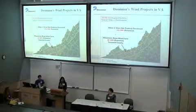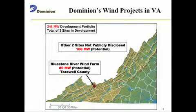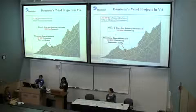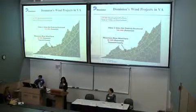So these are the sites in Virginia that we want to build wind power on, and a lot of people know about the Tazewell project. We were in the middle of trying to get that up and running, going through the development process, and Tazewell County put in an ordinance that does not allow us to build structures up to a certain height. So that ordinance has kind of put a stop on the project at that time.